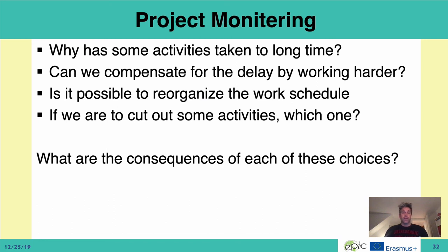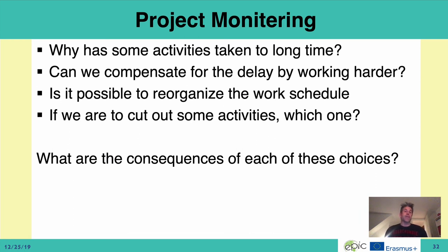There is also the monitoring along the way. Think about why some activities have taken too long — will this also impact us further? Is it something to take into account in the last part of the project? Can we compensate for the delay by working harder, or reorganize the work schedule using buffer time? Or is it necessary to cut out some activities? Instead of standing two weeks before the deadline, as in the Viking model, and realizing you'll never achieve what you wanted, you can plan well ahead to cut out part of the project, reduce the scope, or do something different so that your project still constitutes a whole.